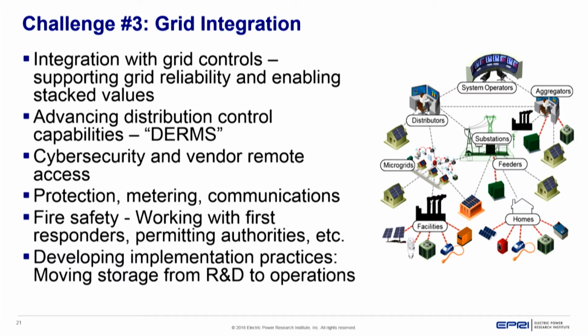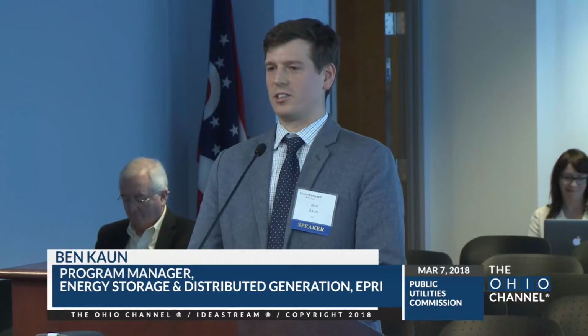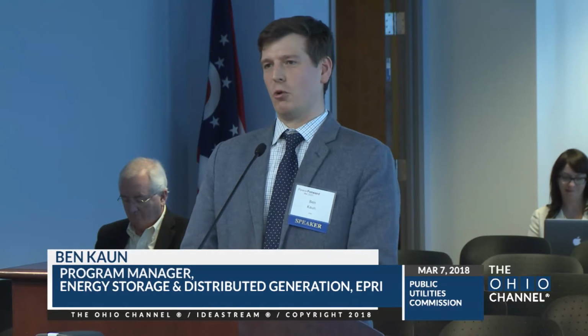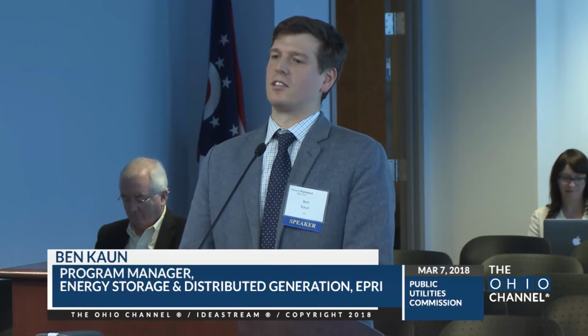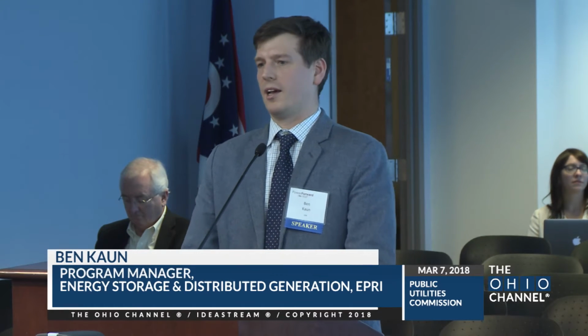Another issue we've seen time and again when trying to do demos of storage is cybersecurity concerns, interacting with the IT department and issues with the vendor of the storage system wanting to get remote access and what the implications of that might be on cybersecurity. That's an area we're trying to work through. Other things like protection, metering and communications, fire safety, and working with external entities. When you go into energy storage, there's no playbook in a lot of these cases, and so you're interacting with a lot of these stakeholders for the very first time. And so there's a lot of learning curve to try to get through a lot of these projects.